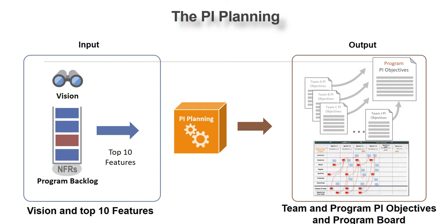A lot of these teams have dependencies on each other, so they have to be constantly talking to each team about the dependency. When are you going to address that? When is that dependency going to be addressed? And based on that, the plan keeps on constantly changing. So at the end of day one, we just have a draft plan ready, and the draft plan is presented to the business owners or the project management team. This is what we are planning.